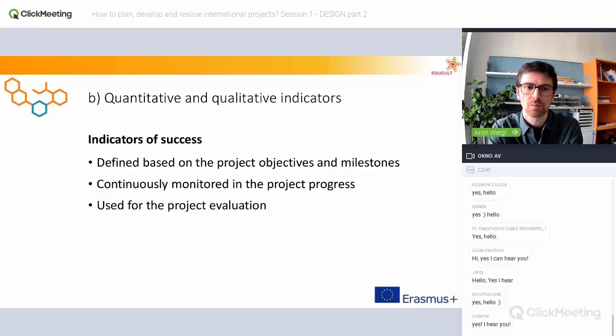And as I said before, it's also then used for the project evaluation, because you can then say, okay, we wanted to reach 10%, or let's say 10 persons for this training. Did we do that? Yes or no? It's easy to say then if it was successful or not. We wanted to include these and that thematic fields in new cooperations. Could we do that? Could we include the field of education for sustainable environments? Yes or no? It's then very easy to also see your results. Okay.